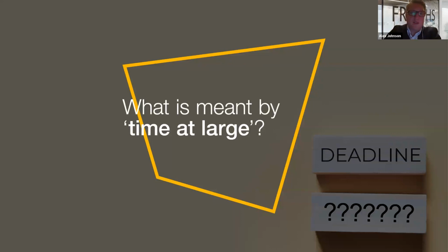Bad for the employer because it can't have its liquidated damages, bad for the contractor because its delay liability is not capped. And I just also wanted to mention another phrase that is a source of confusion, which is time is of the essence. Now that wording has the effect of making provisions that concern time in a contract conditions of that contract. And breach of a condition discharges the other party from its obligations to perform the contract.